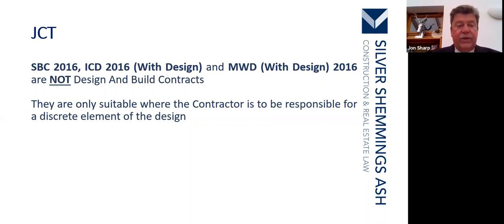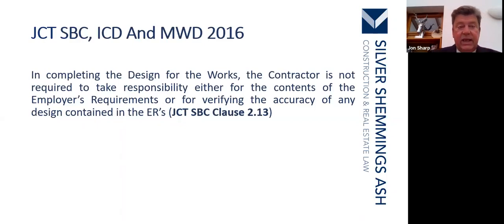JCT Standard Building Contract 2016, Intermediate Contract with Design 2016, and Minor Works with Design 2016 are not design and build contracts. They are only suitable when the contractor is to be responsible for a discrete element of the design. So a tiny bit, not the full shebang, but some very tiny design element. JCT, SBC, ICD and MWD 2016.